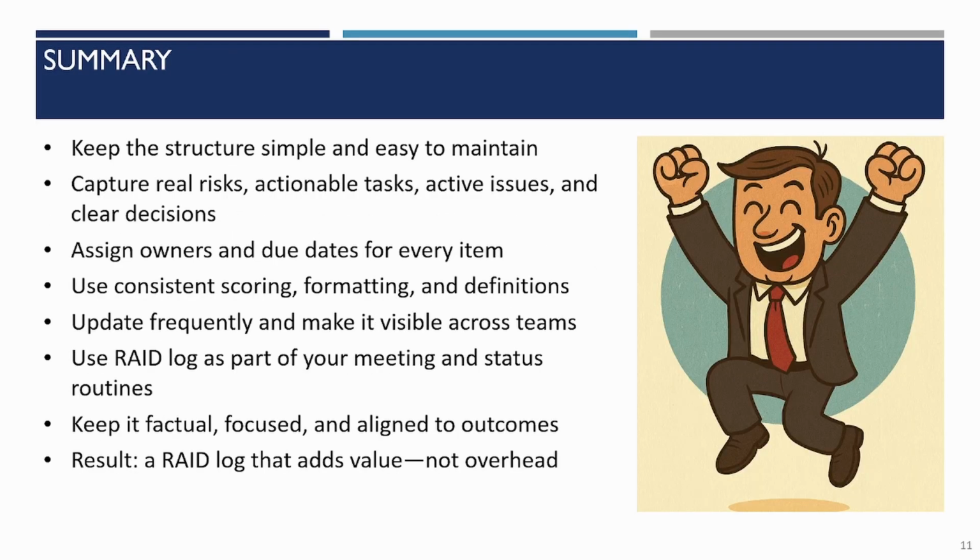and it's maintained. So here's the point: you want your RAID log to be simple and easy to maintain. You want to capture the risks, the actions, the issues, and any decisions that need to get made. Every single thing needs to have an owner, and it needs to have a date. Without that, it just stays in the log, and then nobody's looking at it. You want to use a consistent methodology for scoring it and so on.